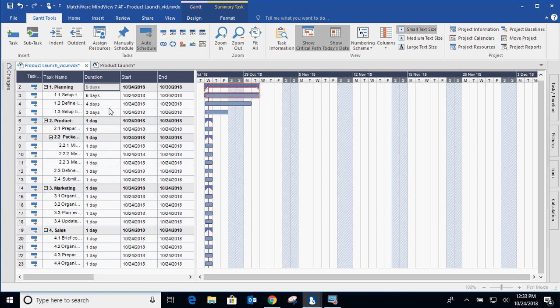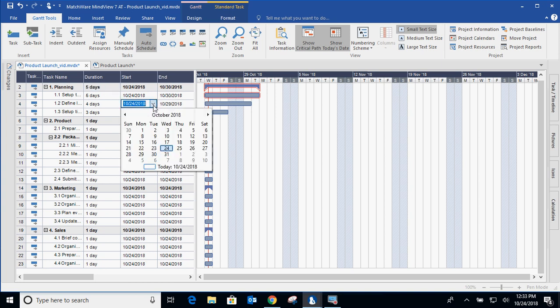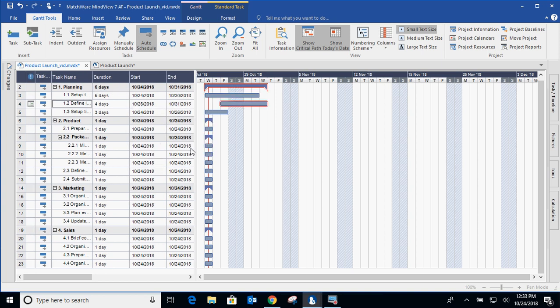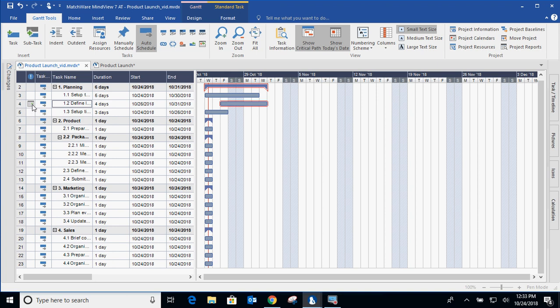Also, you want to estimate the duration as opposed to creating a start-end date. If you determine that you want the start date on the 26th, what that is actually doing is creating a constraint. A constraint is just that. It tells the project when a certain task can be started, can be completed, and we'll get into constraint strengths a little bit later.